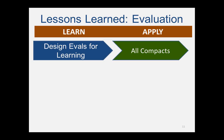We found that we can do a better job of understanding the why if we design evaluations for this purpose. This means several things. First, we're going to need to be more selective, focusing on projects where the learning potential is greatest. Second, we're going to work closely with sector experts and country partners to find out where there is a real need to learn what works. And third, when things go wrong — and they will — we've got to be ready to shift gears early and make smart decisions to evaluation plans as reality bites and changes our initial plans.